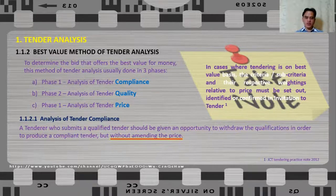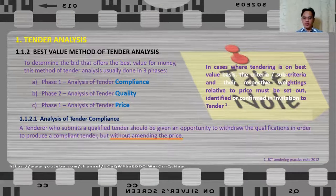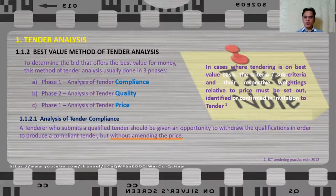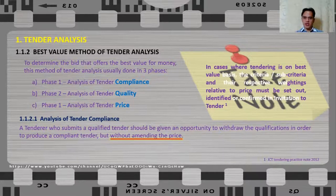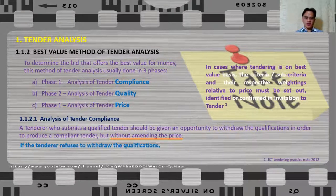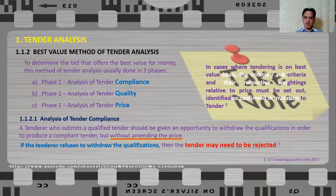The danger of awarding the project to a non-compliant offer is that the cost of compliance becomes variable and may drastically increase the project cost in the end. You have to give the tenderer who submits a non-compliant tender a chance to withdraw the qualification. If the tenderer refuses to withdraw the qualifications, then the tender may need to be rejected.